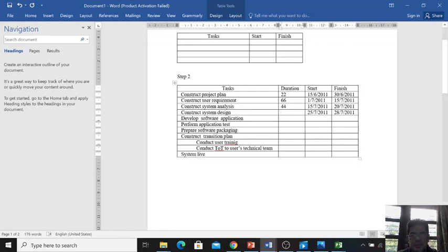System design, you need 2 months as well, 44 days. Okay, now you start the development of the software, so it requires 4 months. For example, 4 times 22 is 88 days. Okay, and then you need 2 months for test, 44 days. So this is in days, yeah.